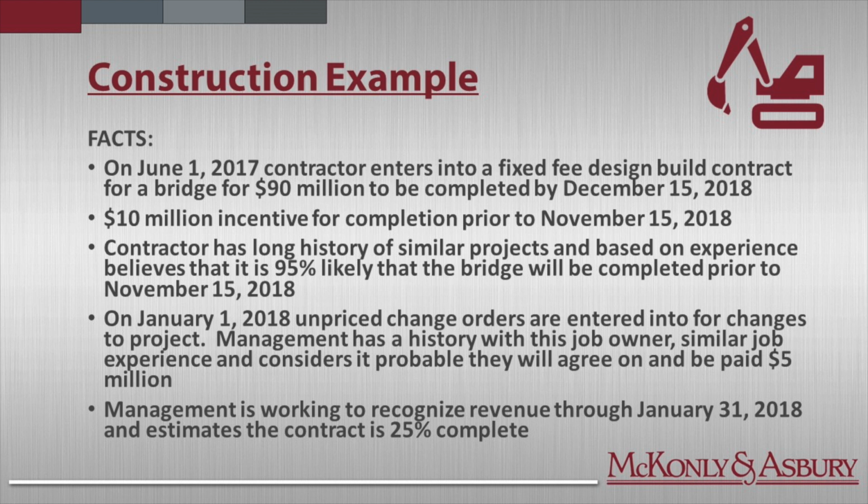There's also within the contract a $10 million incentive/award for completion prior to November 15th, 2018. The contractor, it's not the first time they've built a bridge. It's a long history of similar projects, and based on previous experience and all the other bridges they've built, it's probable, 95% probable, that they will complete the bridge prior to November 15th, and that's a key date because of the incentive above.